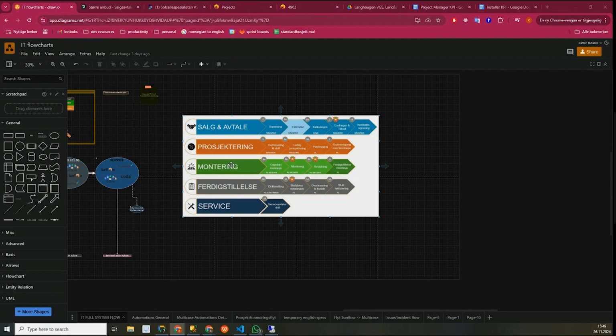Installation is the actual execution phase when you do the project, when you install the project, do what is necessary to finish the project, and then you have the final stages where you are doing end documentation, when you are doing, for example, testing. It could be basically when you are preparing it for delivery and final billing to the customer. And then once that's done, then you have post-delivery service. So once it's in production to the customer, you may do service out of pocket for the company or on a paid basis for the different project entities.